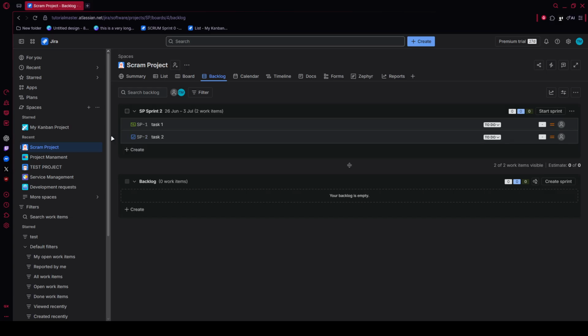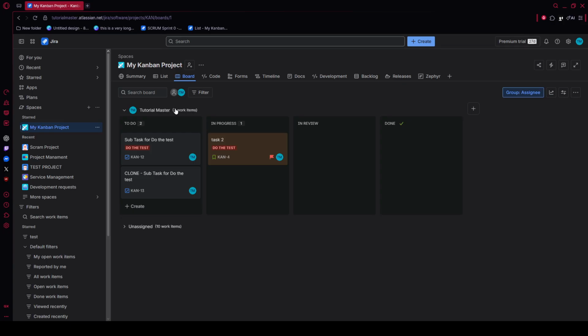Jira usually starts with a basic workflow, but you can adjust it to better match your team's process. Click the plus sign on the far right side of the board to add a new column, then enter a status such as code review or QA validation. You can also drag the column headers left or right to put your workflow in the order that makes the most sense.